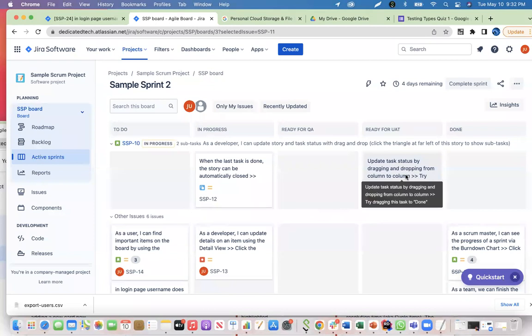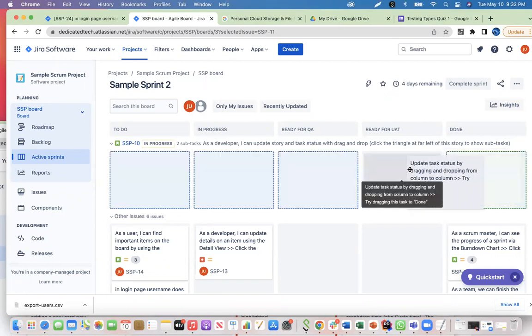Everything looks good. I looked at the design. I also looked at the scenario. Everything checks out. Please let me know if you find anything and I will retest it. So basically you're opening the door for the product owner to tell you, hey, I found this issue. Then you can simply take the issue, create a bug for them, and move this back to progress, right? But that shouldn't be the case because we want to do our job as thoroughly as possible. The UAT testers only have to double check, and it should be moving into done. So the UAT tester will then move this to done.